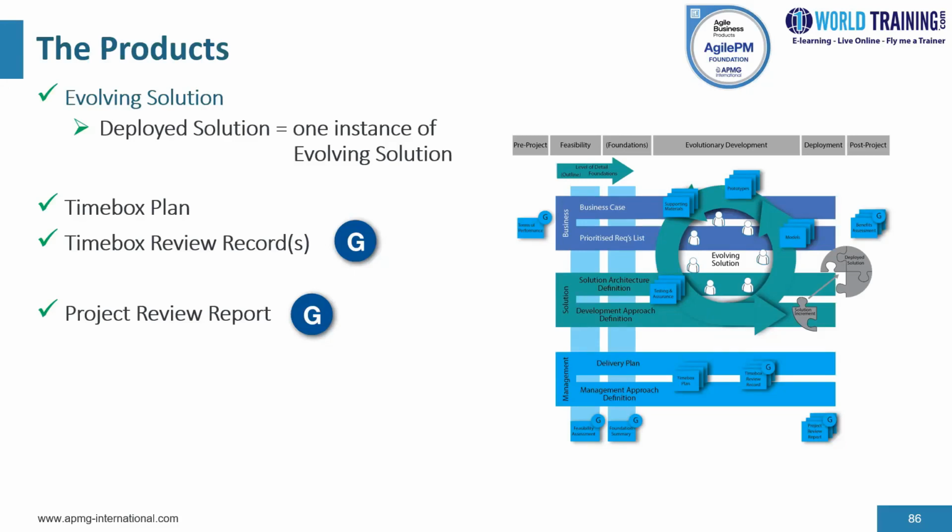One of the other purposes is, where appropriate, to describe the business benefits that should now accrue through the proper use of the solution delivered by the project up to this point. So after the final project increment, as part of the project closure, a retrospective covering the whole project is carried out that is partially informed by the records for each project increment.